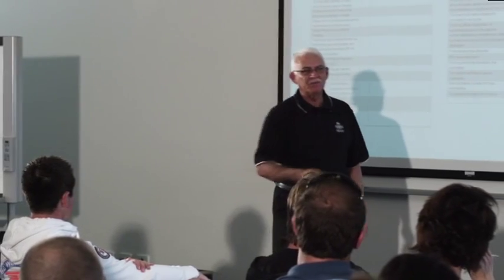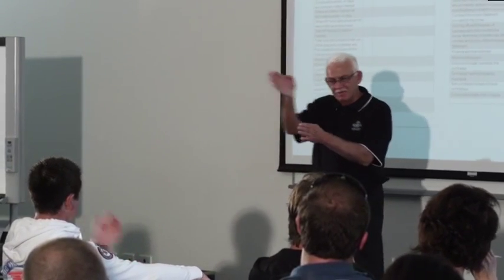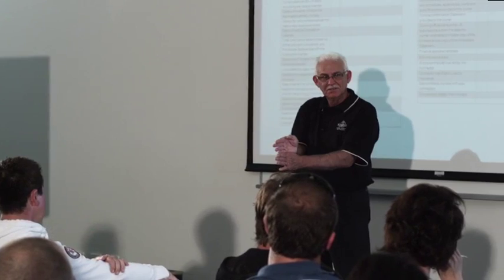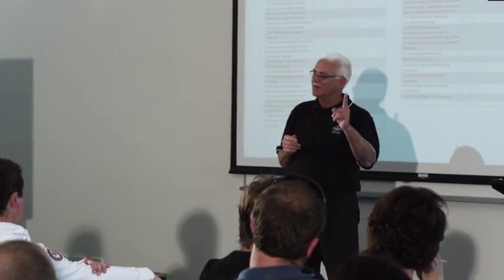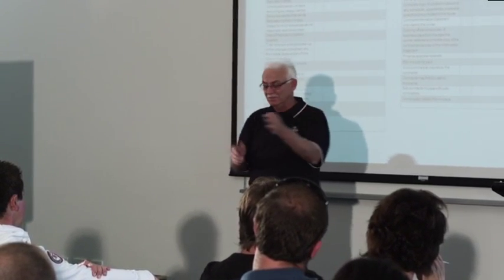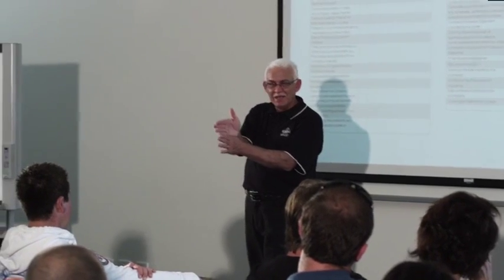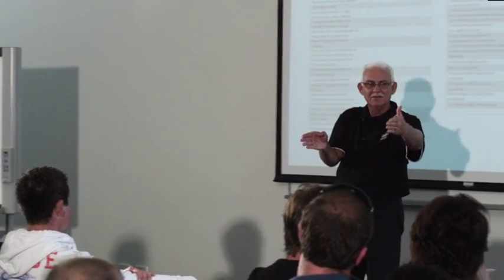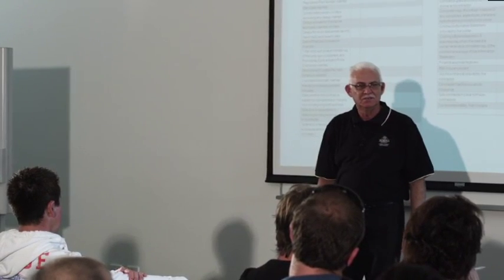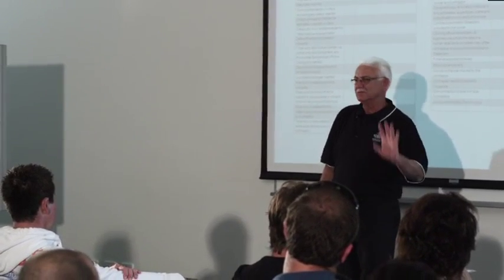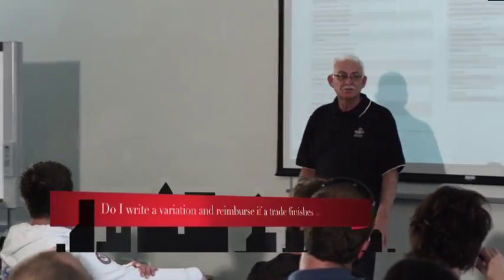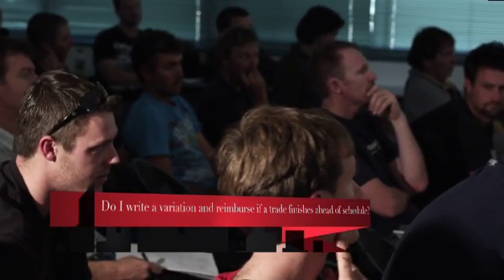Bang. And on top of that, my progress payments, which are due then, now this is tough, I wouldn't go this far, but you're entitled to it. My progress payment, which is due then, is now not going to be due for another month, so I'm going to charge a month's interest. You're entitled to it. I don't say that you'd ever do it, but you're entitled to it. No, absolutely not.